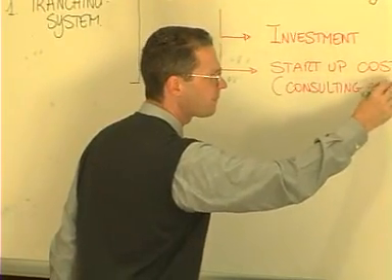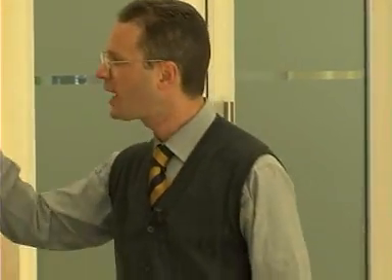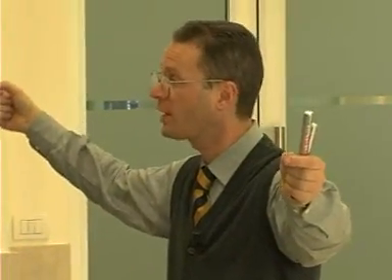And then, in order to finance what I called owner's costs, meaning oneri del proprietario, owner costs. Basically owner costs are all ancillary facilities that must be added to the base facility. Take for example the case of cogeneration 1. If Enel doesn't build the high voltage connection, you must also build this ancillary facility. And if you build a cogeneration facility that must be connected to the roads or the highways, you have to bear the cost of building a road for the access to the plant. So all the additional costs related to this project must be financed. These are called technically owner's costs.